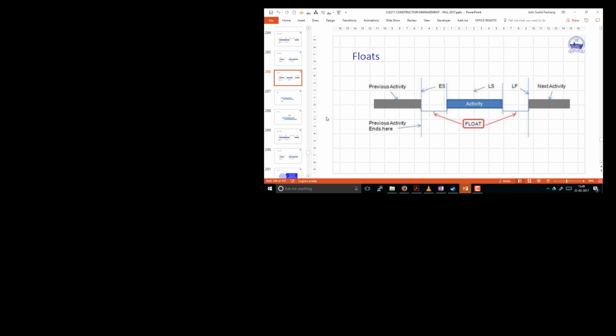You can allocate resources based on your availability. So perhaps if I keep it here, you may not have that particular resource. Resource means maybe a design engineer or somebody. So what you can do, you can move this activity in such a manner that you still can use your resources in an optimal fashion. But when the activity is on the critical path, you don't have that luxury, unfortunately. Now I will wrap up this lecture here.